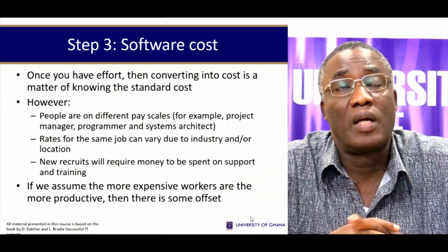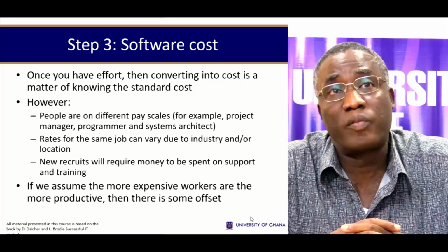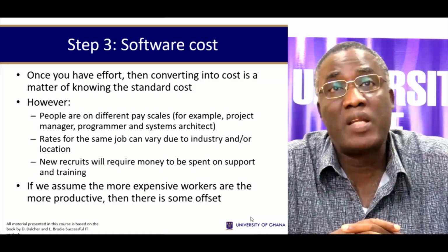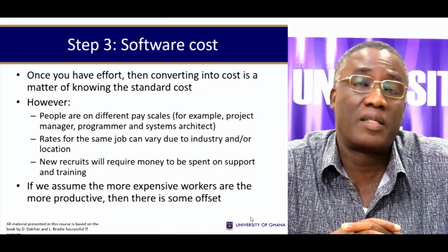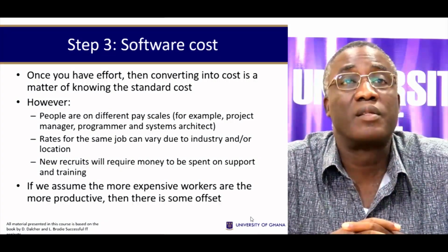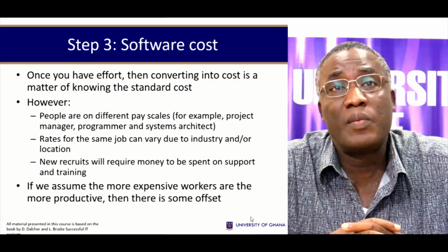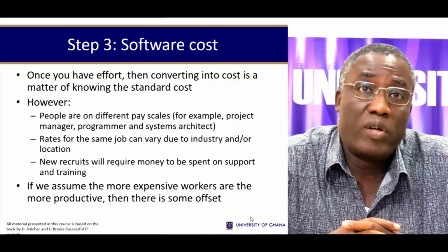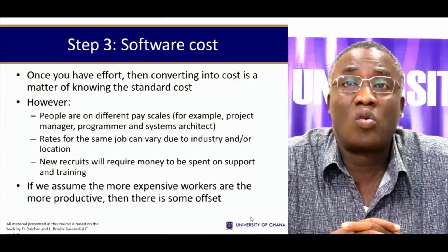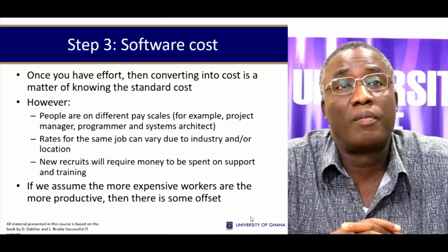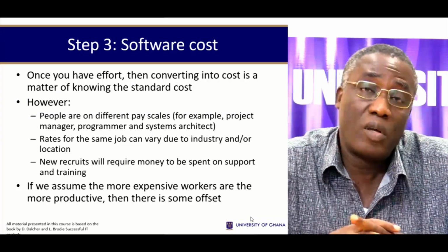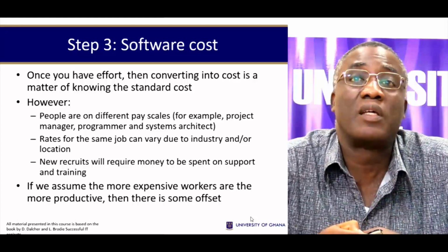Once you have an effort, then converting that into cost is a matter of knowing the standard cost. However, there are a few things to take note of. People are on different pay scales. For example, project manager, programmer, systems architect, etc. They are all on different pay scales. So the rates for the same job can vary due to industry or location. New recruits will require money to be spent on support and training. If you assume the more expensive workers are the more productive, then there's some offset that you can achieve here.